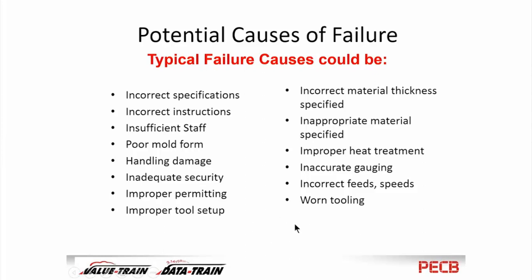These causes, by the way, are not part of the risk calculation. These causes are things that we can identify while we're going through the FMEA process, so that later on, if we decide to fix any of this stuff, we have a head start, because as long as we're thinking about it, the causes are likely to be obvious to us.